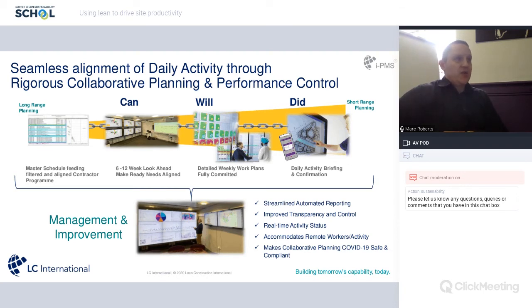So across each of those levels, whether it's 6, 12-week, weekly level, daily activity, that cycle that we saw earlier on can be applied. So we're taking action, resolving daily issues as they come up, which is almost reactive, but all the way through to our proactive look ahead session, where we're exposing these issues before they actually hit us and driving action and resolution early on.